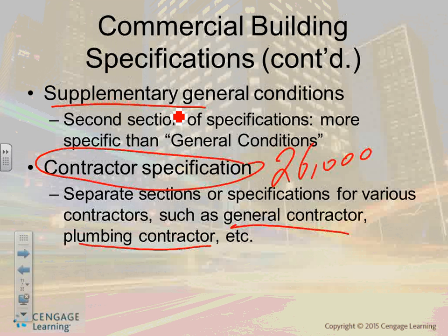So you'll hear, where's a Hunt guy? He's not here yet. But at Hunt and Parsons, when they bid a job, they get all these specifications. The electrical ones they go through thoroughly. But the mechanical ones, especially, you know what they do? They take them in Word format, and they do searches on them. They go to the mechanical contractor section and search for disconnects, certain words, to see: are we liable for disconnects, or is the mechanical contractor liable? It sends them back to the right place. They search certain words, because you can't read all the mechanical spec and the electrical.